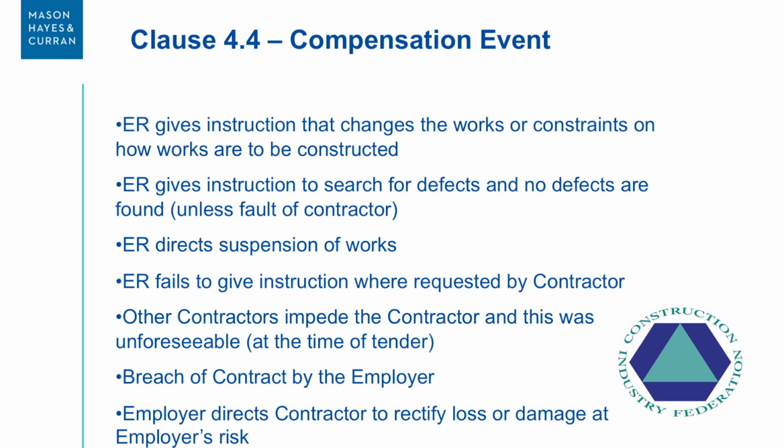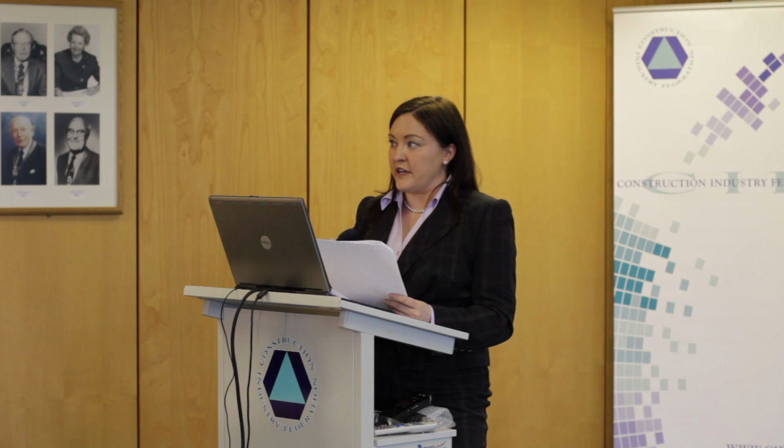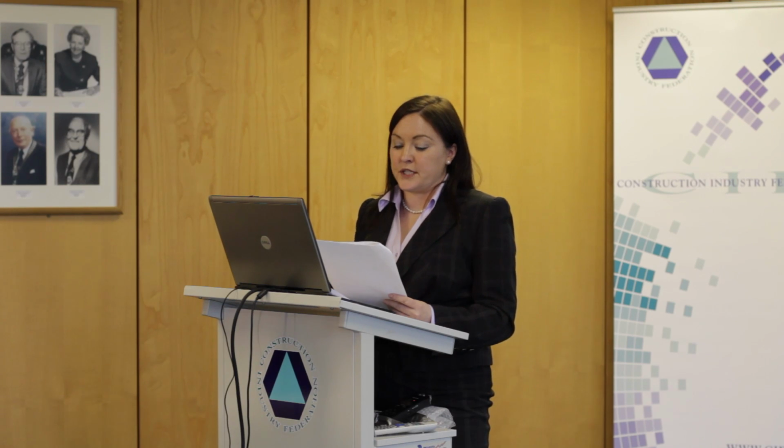If you ask for an instruction and you don't get it, you see what I mean then, this ties in, it becomes a compensation event for which you're entitled to make a claim. So it's very important that if you need an instruction, you ask for it, because it really does trigger it. And as I say, it triggers a price adjustment under the contract, so very important.